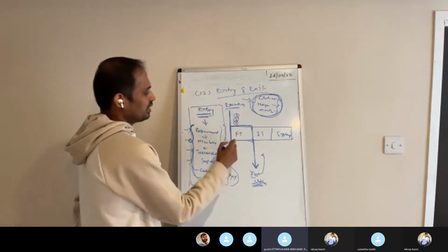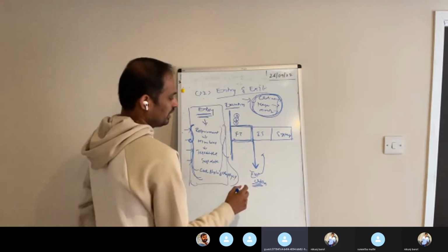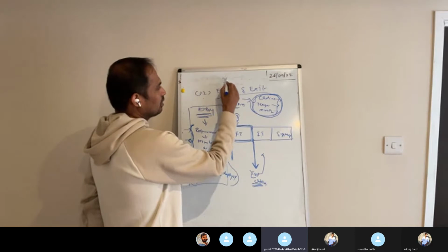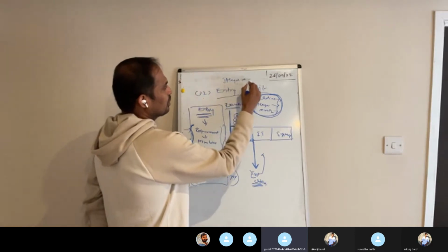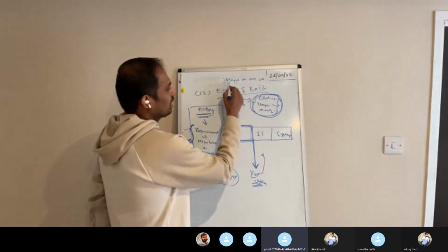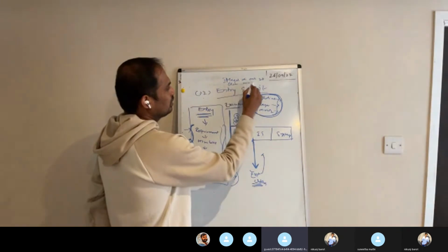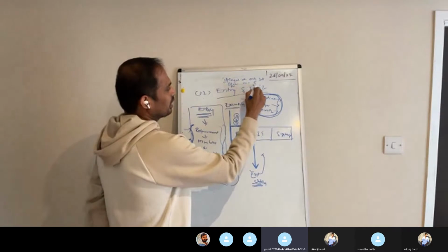So for functional testing exit criteria, we decide major defects should not be more than 20, critical defects should not be more than 5, and minor defects should not be more than 40.